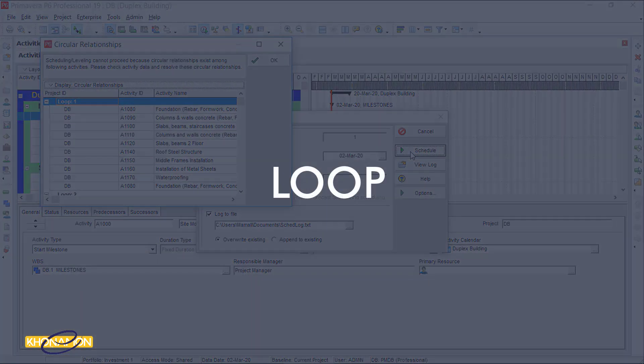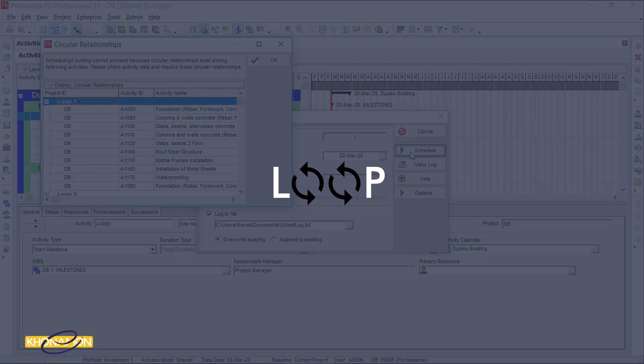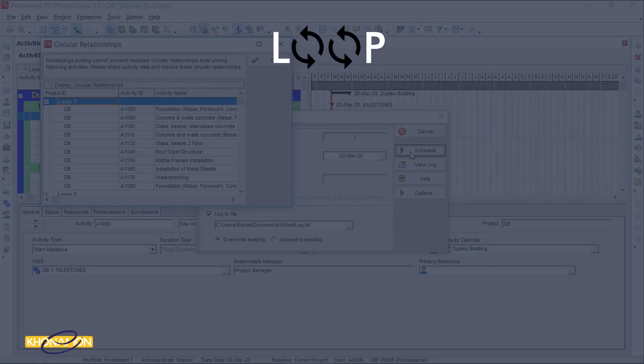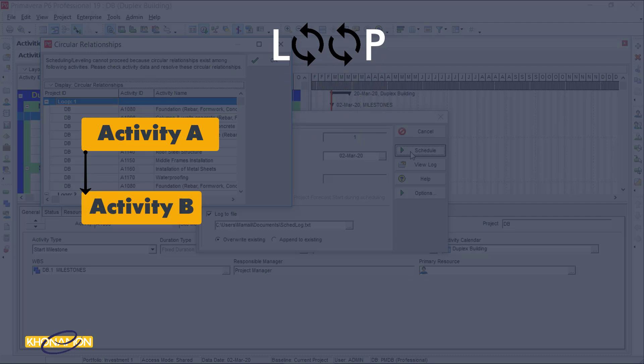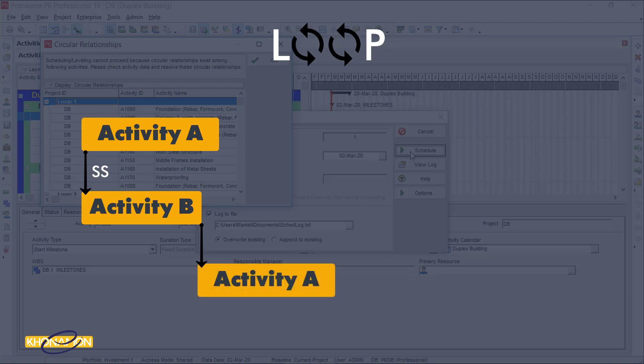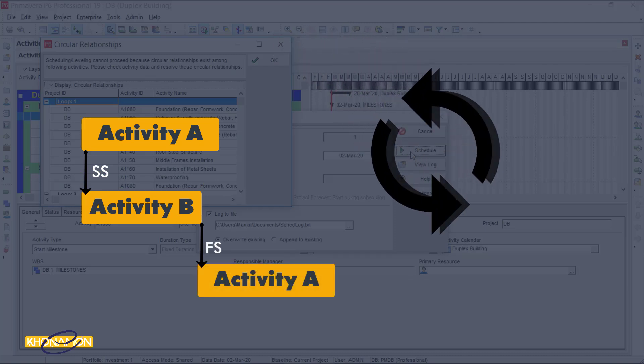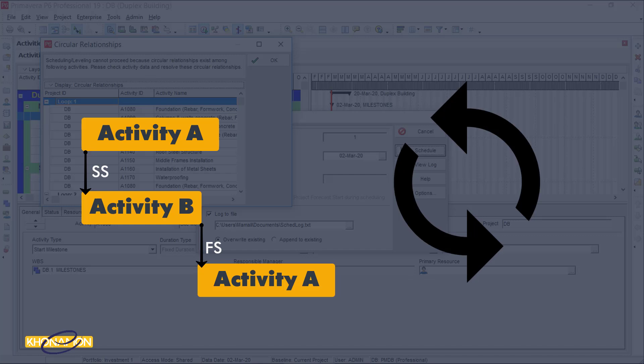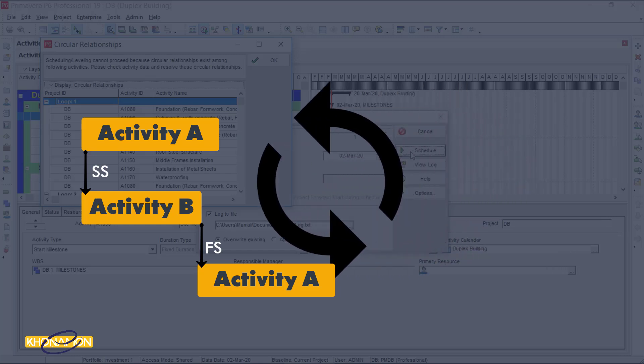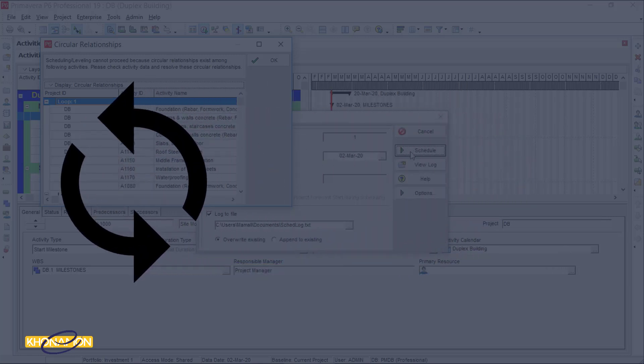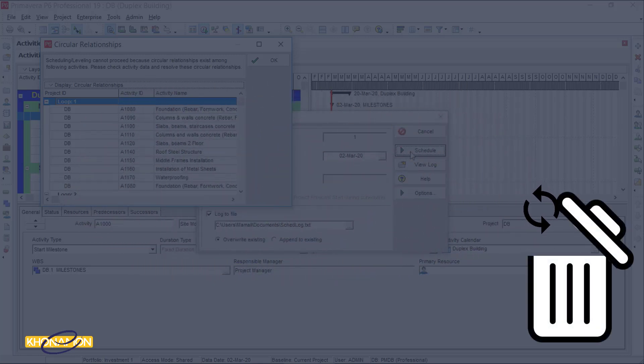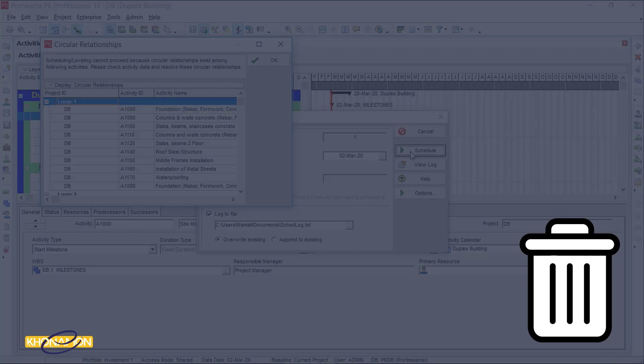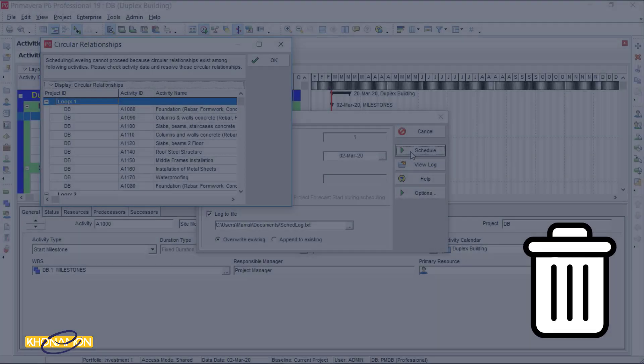Loop is the repeated logic in the schedule. For example, when you link activity A to activity B with SS, then you link activity B to activity A with FS, here you make a loop. P6 cannot schedule until you eliminate all loops.